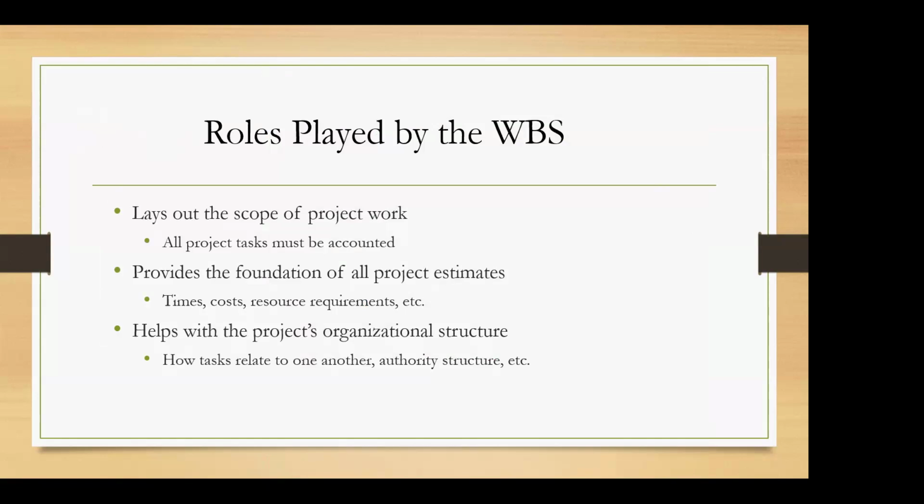And your WBS will be the foundation for all the estimates that you make in the project. You will be doing time estimates, you will be doing cost estimates, you will estimate how much of human resources you need, likewise. So these estimates will be based on the work breakdown structure that you do.